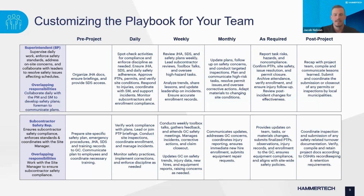I'll give you an example. We had a drywall company that typically worked from lifts. They didn't start the job prepared to get engineered drawings for a dance floor for a scaffold to do this vaulted ceiling that we had. But that's just an example of grabbing some of those aspects and those one-off scopes of work, and then figuring out who's responsible for it. Is it the subcontractor or is it going to be the general on this? And just aligning in that much detail.